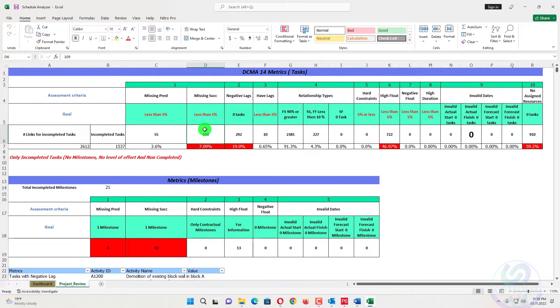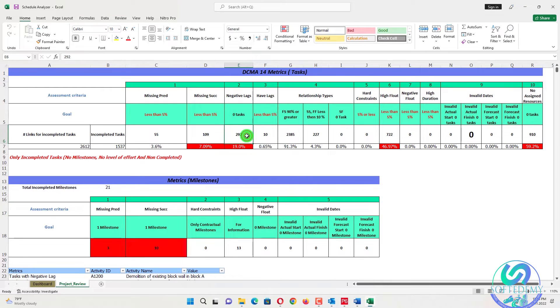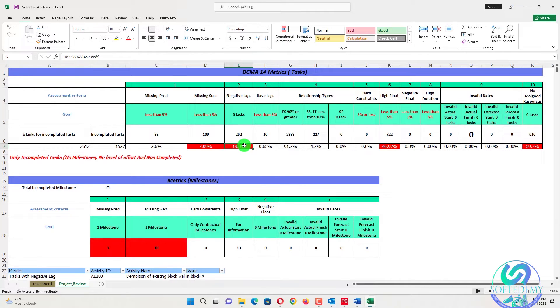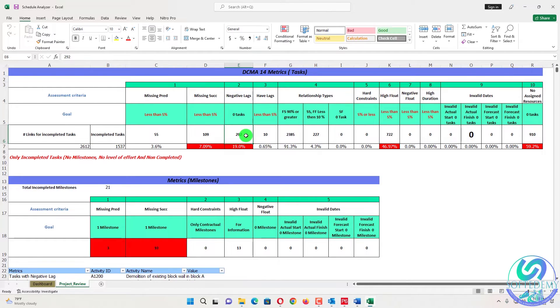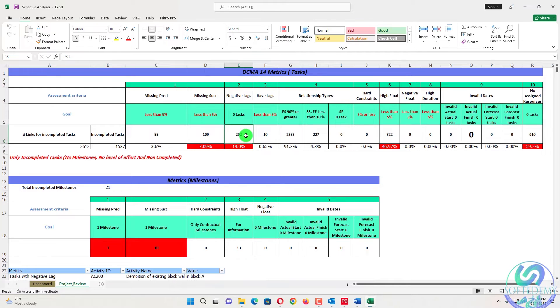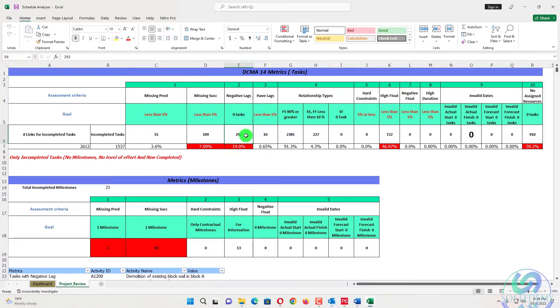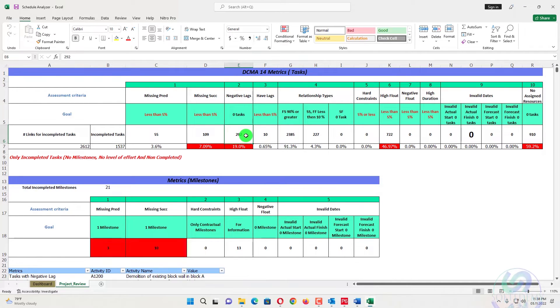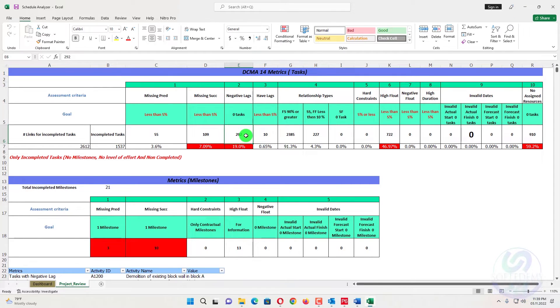The next one is negative lags. The negative lags should be zero activity. There are 292 activities out of 1,537 activities, 19%. It should be 0% here. So that are also greater. You need to remove all your tasks that have a negative lag. The negative lag is also called lead. Lead is not acceptable in DCMA. So if you don't want to use that lead, just don't use lead. If you have less lead like minus two days, minus four days, just decrease the duration or you can use start to start and finish to finish relationship to close and to remove that dangling also.